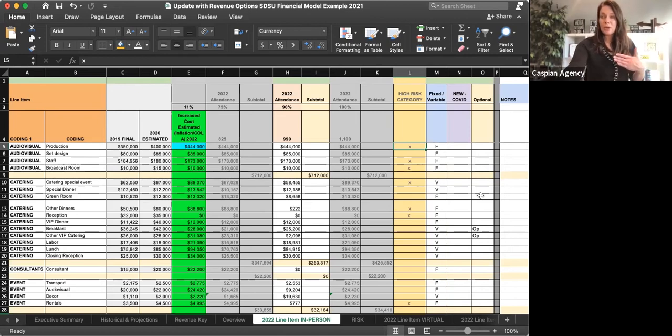And I think it's going to go haywire. I don't know where it's going to go, but I think it has the potential to go higher than where it is right now. I'm putting in a realistic number, but I want to alert my client that this is a category that could have some expansion in case they want to put more contingency in their overall budget.